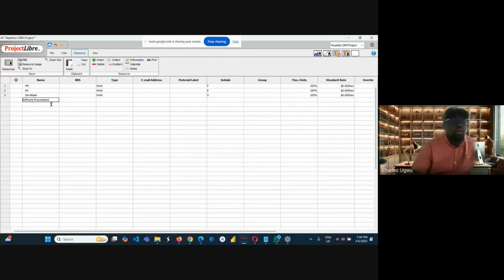Okay. And now you see all these resources here, they are all work. Work means that they are human resources, but this particular one is not work. This is material, so it's different from others.